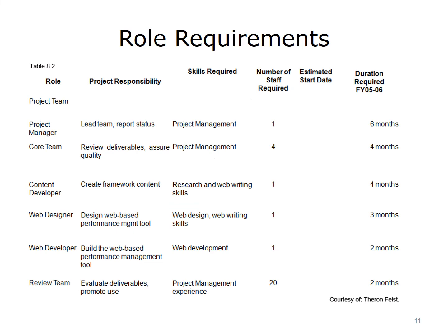The Role Requirements Grid outlines the positions and duties necessary to complete the project. For each project role, it details its responsibilities, necessary skills, the number of employees assigned to that role, and the estimated start and finish dates for that role on the project.